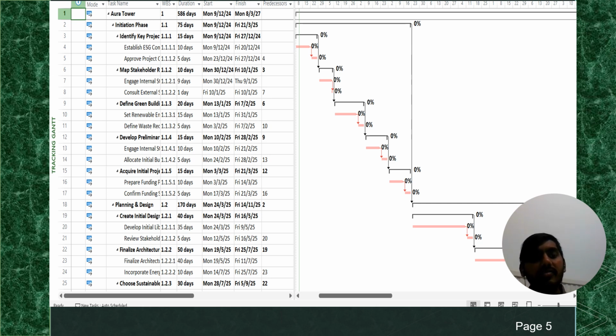The Gantt chart visually displays task dependencies with connecting arrows between the bars, and I made sure to link tasks so that they followed the correct order. For example, the project charter had to be finished before moving to identify key participants. The timeline updated automatically if I made any changes, which kept everything aligned.